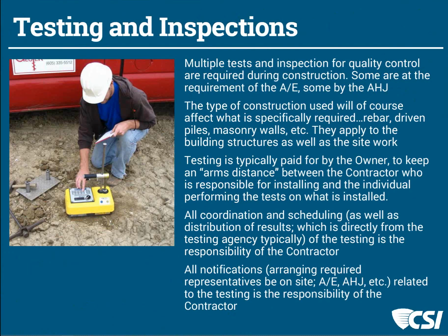So typically, in our area, the owners pay for these, but the contractor is obligated to schedule for them and have them held when they are required, and be responsible for notifying people to be on the site when they need to be for the sequence of the work. It becomes a part of the means and methods of the job. Let's take a look at the next slide and see if anybody has any questions at this point.